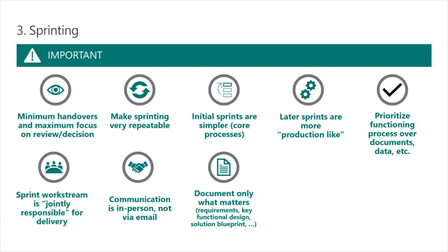Again, it's important that you minimize the amount of handovers. So every time you have a document handover, which requires somebody to go away, review, comment, approve, hand back to you, then somebody else hands it to another team, that is dead time, right? You need to minimize that so the maximum focus is on a review in the room. So if you need to get a design document reviewed, do it in a workshop environment in the room. Talk it through, right? Don't wait 5 days for it to go around a cycle. Make sure all of that can happen within the sprint.